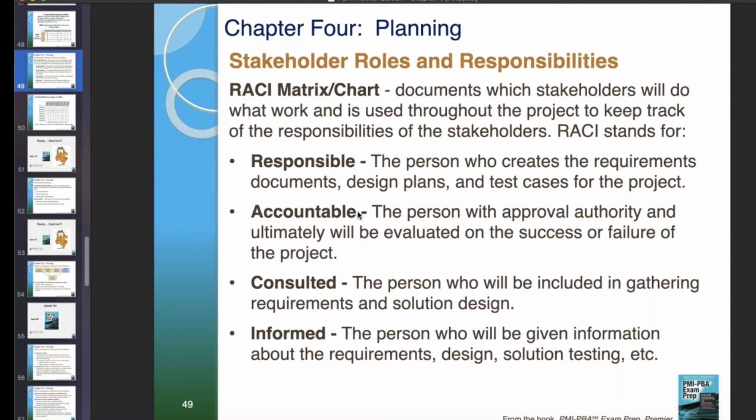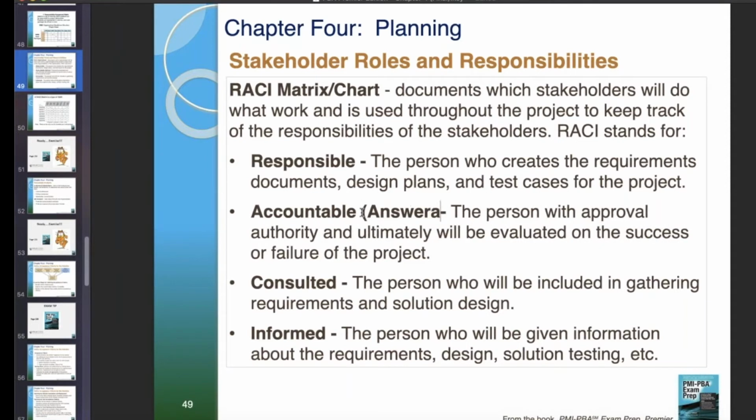I also call the person accountable, that A, to me, also stands for answerable. They are answerable for that work package, for that work. They may not be responsible to do the work, but they're answerable to senior management for it. You always got to have someone listed as the accountable party.